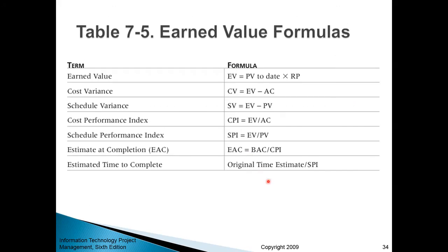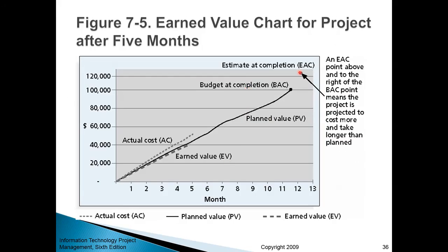So using the calculations that I showed you here, this final completion dot moves up and to the right. By moving to the right, it means you have a deviation in terms of schedule, so it will be delayed by approximately 1 month. And here you have extra money, roughly $125,000. Yeah, so your budget will be exceeded by $25,000.